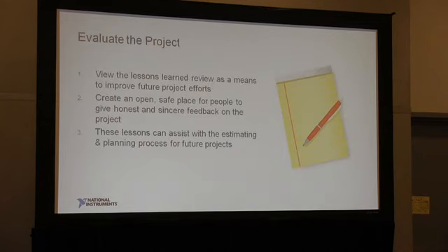At Certec, we do lessons learned projects on the larger projects to get the team together. It's a safe place. It's not a blame type of situation. We want feedback. What did we do right on this project? What did we do wrong? What parts took a lot longer? What did we miss when we were estimating this project or budgeting for it? Let's find out how we did on this project and how we can improve in the future.